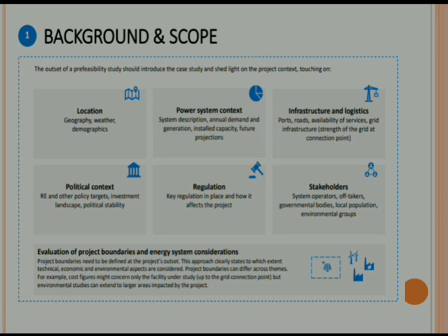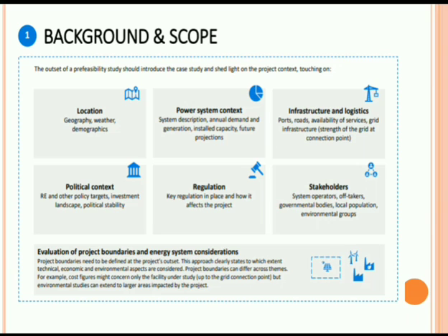pre-feasibility study. In this first step, background and scope, we will evaluate the project boundaries and energy system considerations that are needed here. Project boundaries need to be defined at the project outset. This approach clearly states to which extent technical, economic, and environmental aspects are considered.